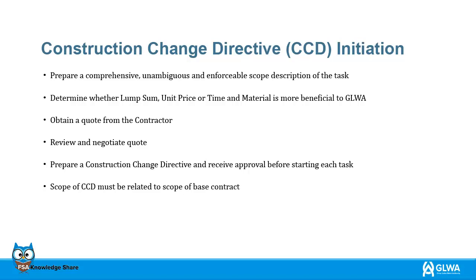You will then prepare a CCD and get approval before you start a task. The scope of the CCD must be related to the scope of the base contract. It is recommended to only include items related to your scope of work, which will eliminate scope creep.